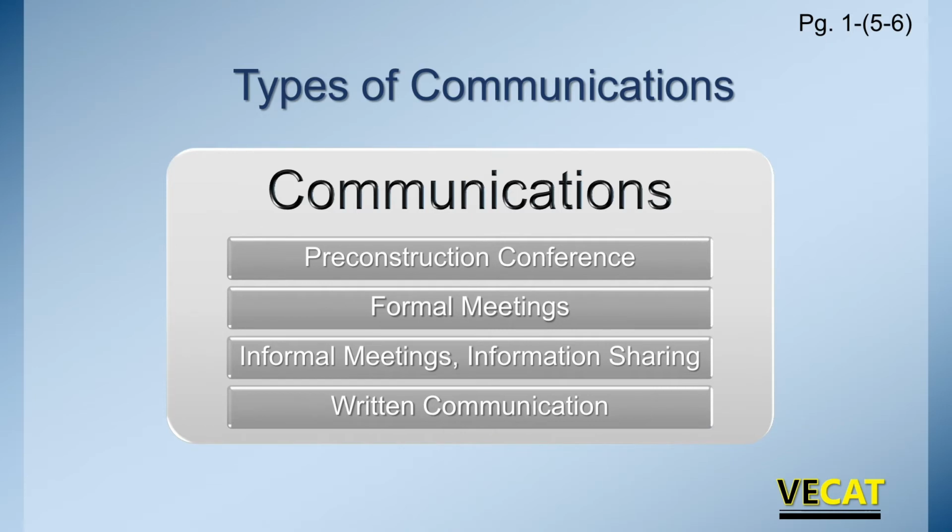So, talk a little bit more about communication because it's vitally important on your project as you're producing material, some of the type of communication that goes on. There's pre-construction conferences. So before the project starts, the VDOT team will call together the contractor team and they'll come together and talk about the project. They'll be talking about the materials, the mix designs, and making sure everything is approved materials. Pre-construction conferences are a requirement.